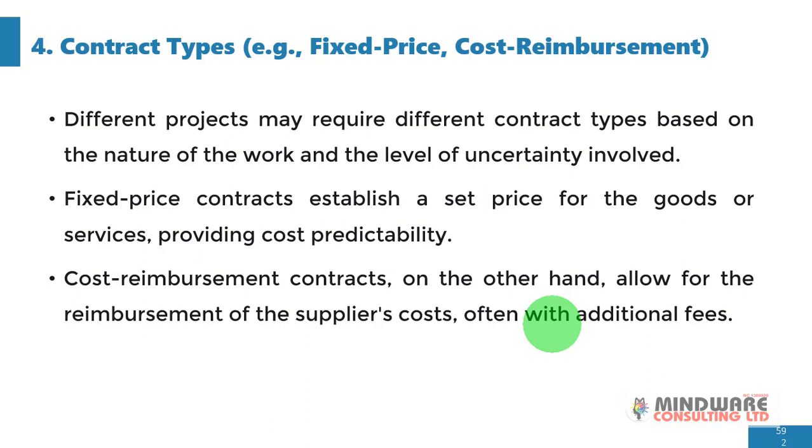Maybe they already have an established agreement about a particular cost for a product or service, or what needs to be spent. At the end of the day, if it goes more than that, maybe price increases or there are additional expenses in the course of the supply processes, then the project manager is meant to reimburse the vendor or the supplier those additional fees or costs. That's why we call it cost reimbursement contract.